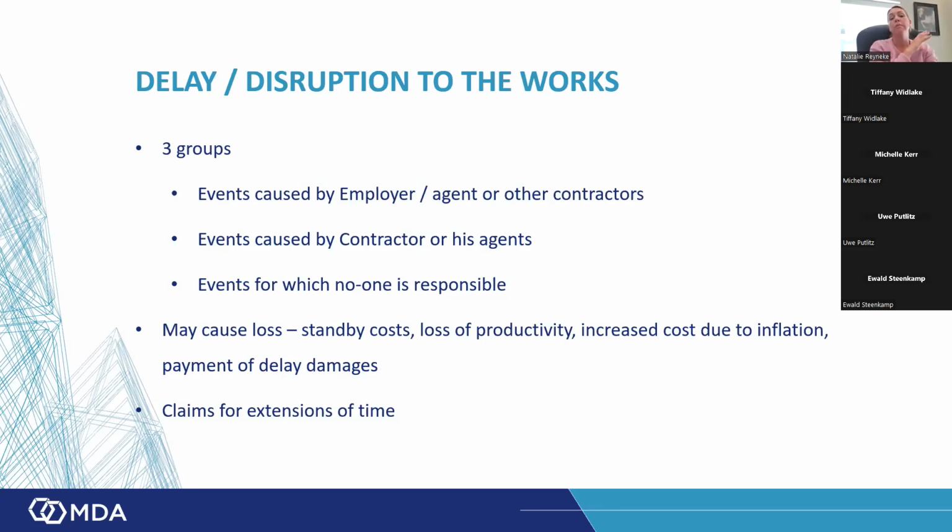The FIDIC does talk about when you get cost and when you don't. Okay. And then obviously under NEC, it's the compensation events clause. So there you get your costs under your shorter schedule of cost components. So yeah, it's interesting.